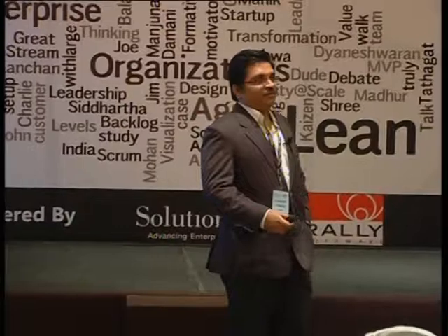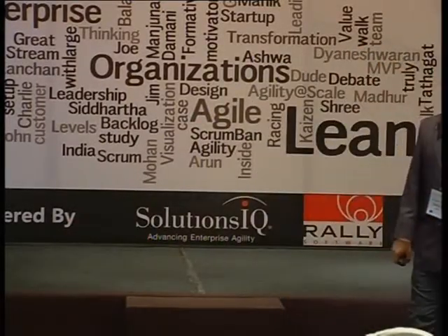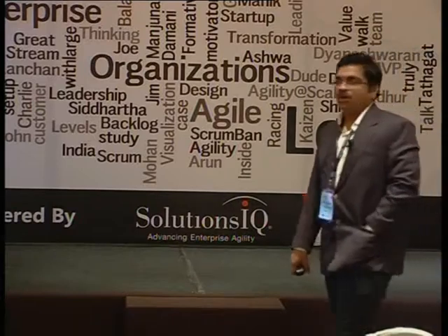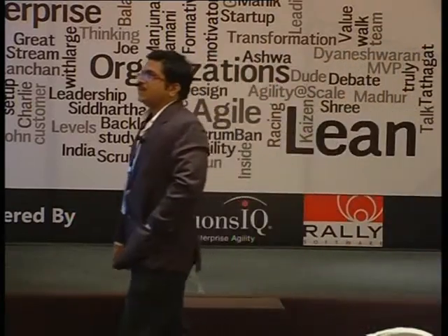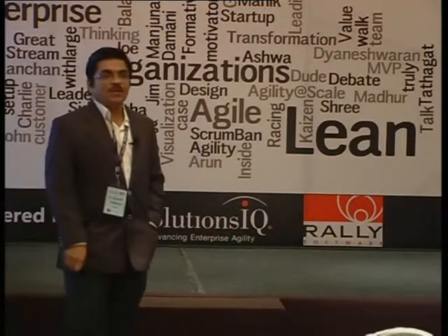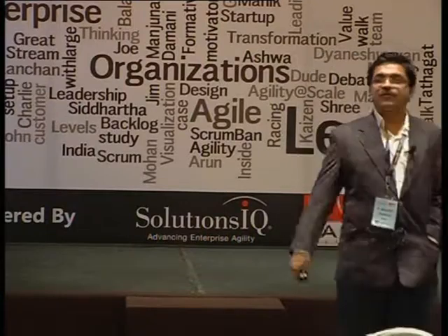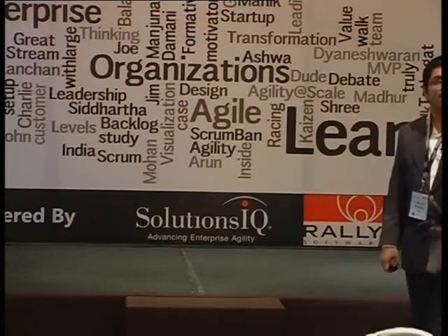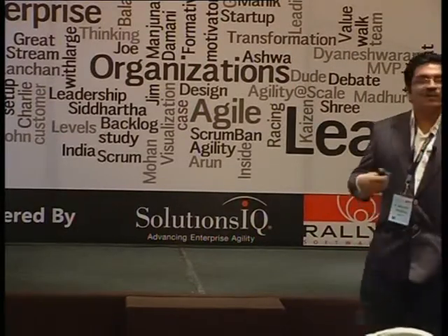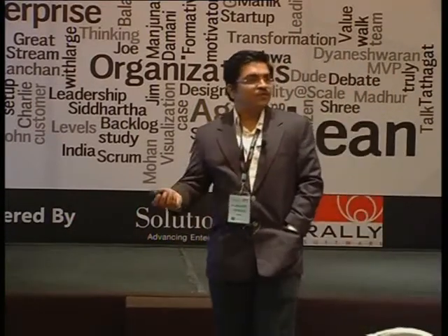When things are not made visual, and when you don't have team huddles happening on a daily basis, what we typically see is the tasks which could be completed earlier don't get completed, because there's always a tendency to postpone. And I, as a developer, would always know how much time a particular task might take. So I'll probably postpone it till the point that I have a comfort level so that I can try to finish it before the due date.